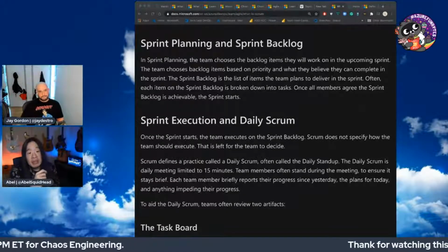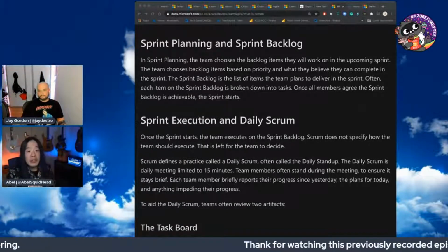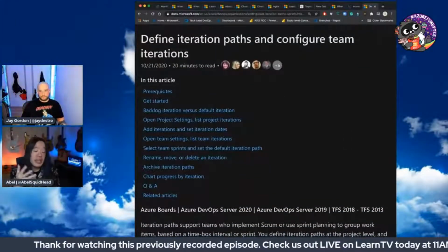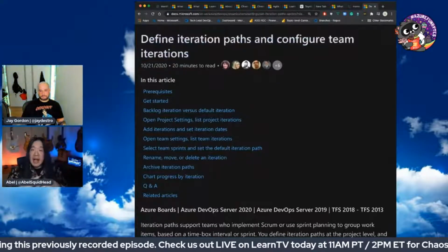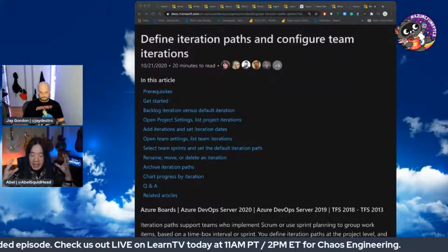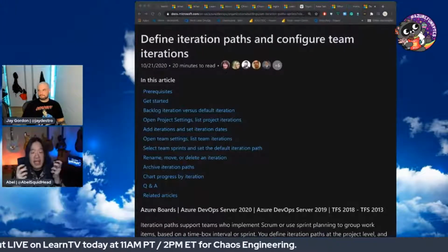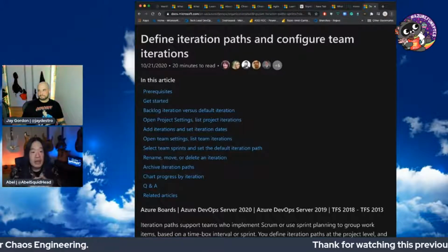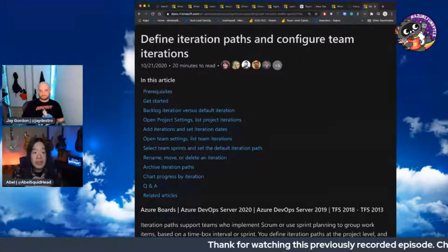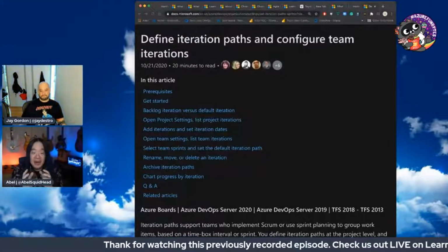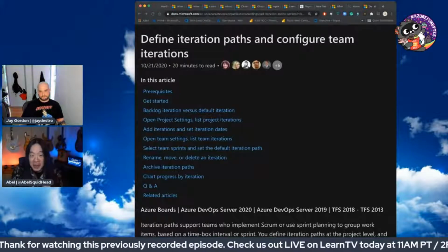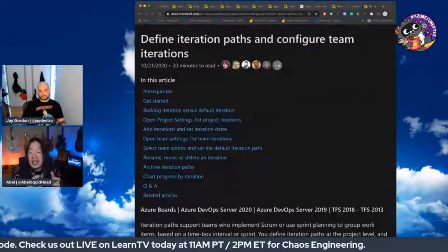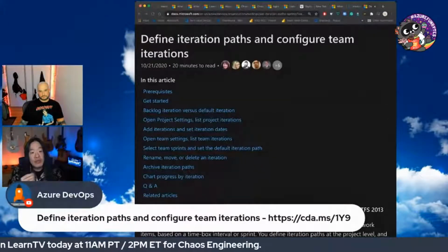The sprint's just an iteration, right? So when you decide you're going to go Agile, you need to decide how long your iterations are going to be. Is it going to be 1 week, 2 weeks, 3 weeks, 4 weeks? Somewhere between 1 and 4. I happen to love 2-week sprints because I feel like that's fast enough where we can get lots of feedback and course correct really quickly, long enough where I can get enough dev done where I feel very productive, right? I've been on teams where we have 1-week sprints. Those are fast, right? Now, granted, we commit to a lot less work. You can still be highly productive. It really doesn't matter what the sprint length is. It depends on the team that you're in and what works for that specific team.